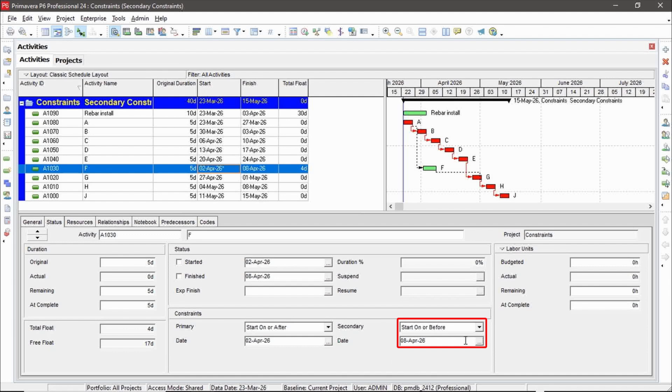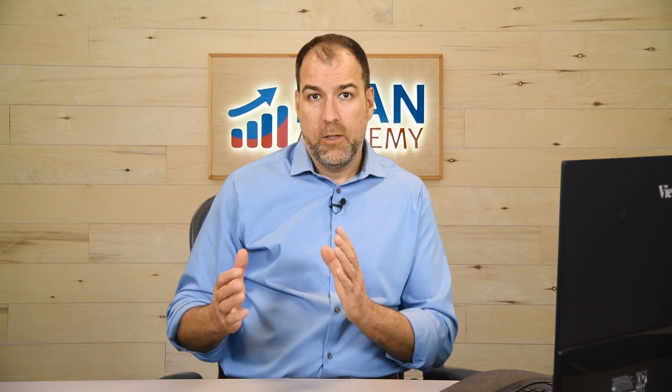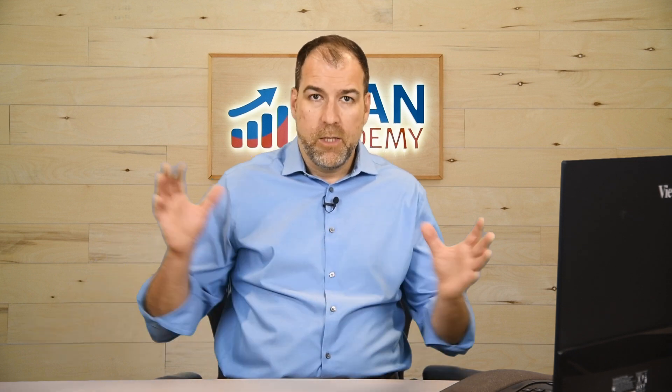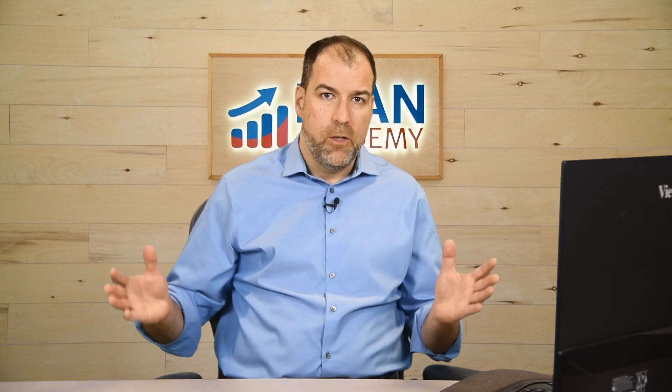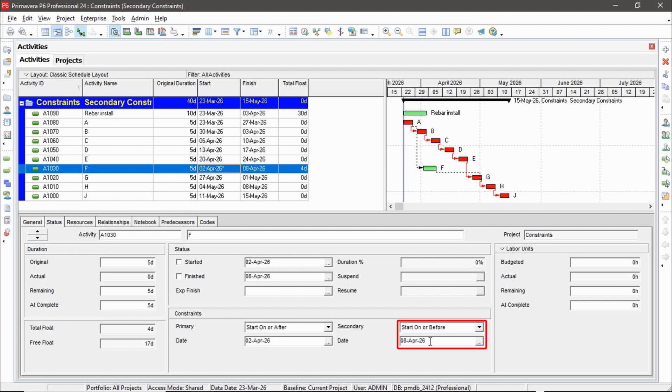And that's because of this secondary constraint. The secondary constraint has forced us to use up some of that float or erase some of that float by setting this range. See how that happens. So now I'm still starting on April 2nd, but I can start as late as the 8th.